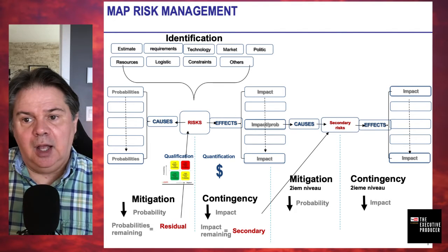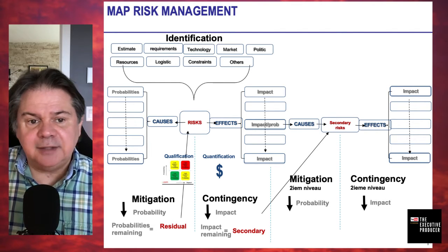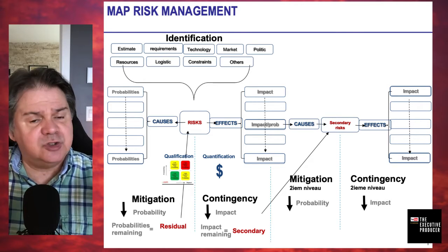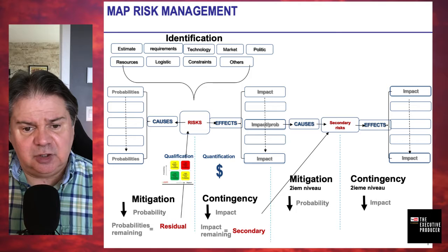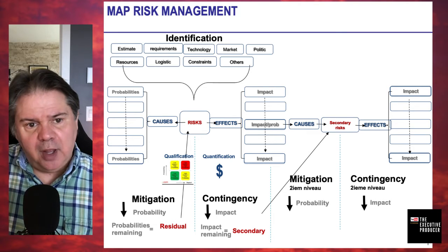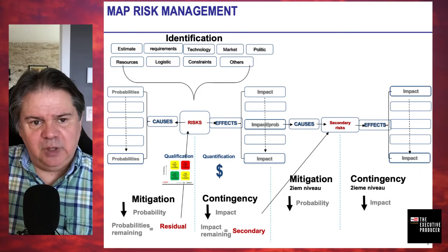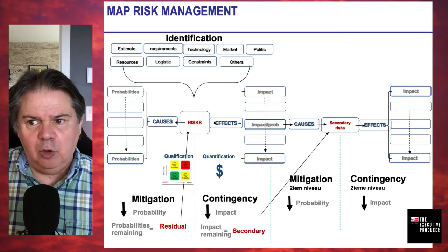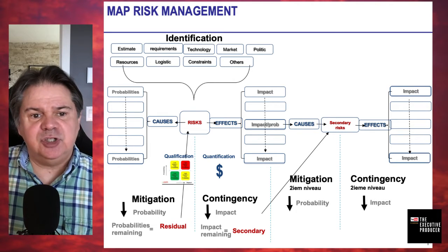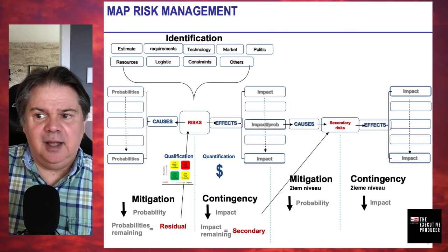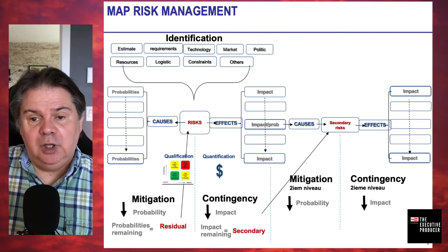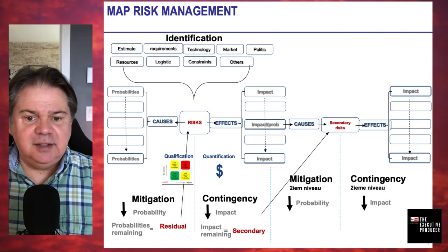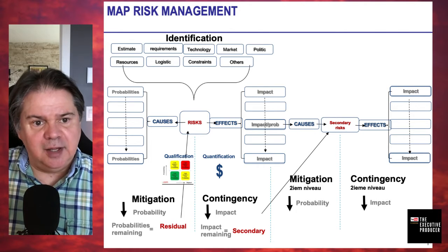Of course there's also technology, market, politics, resources, logistics, constraints, and others — any area that might come back to bite you. One good way to figure out if you have all the categories is to understand from all the stakeholders whether they can identify an area you may have missed. The idea is for you not to be surprised about a scenario that is well-known and that you didn't consider.